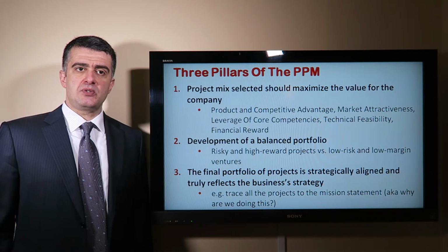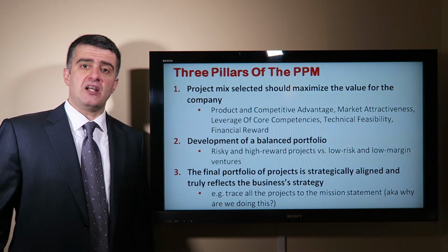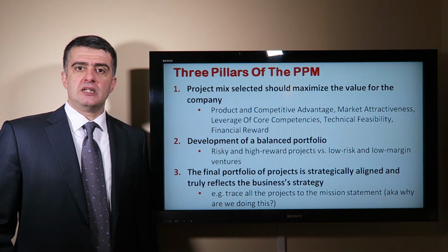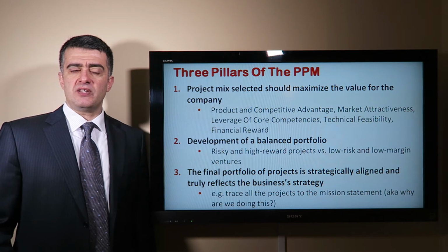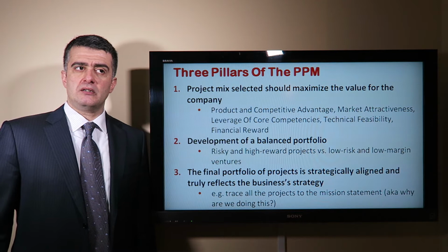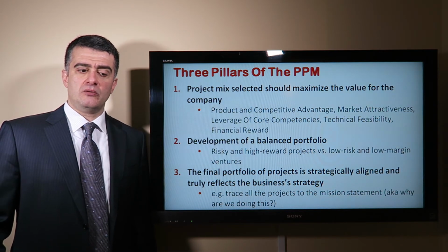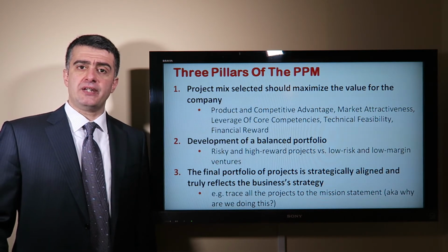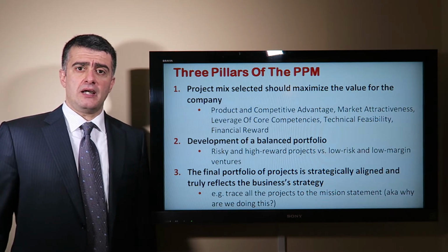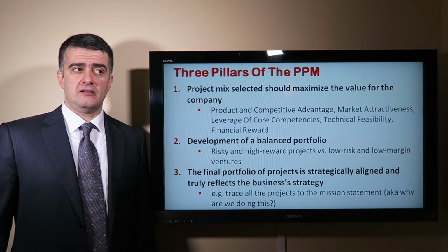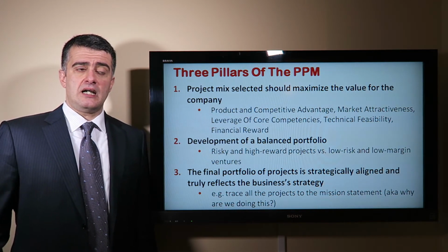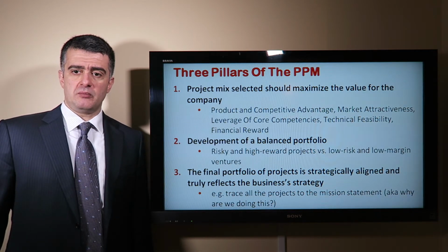That's why the first attempts to evaluate the value of the projects were using net present value, internal rate of return, return on investment, etc. But fortunately, very quickly people discovered that relying on financial data when you're trying to forecast the project value is not a very reliable thing, so to speak. And as a result, scoring models have been developed.